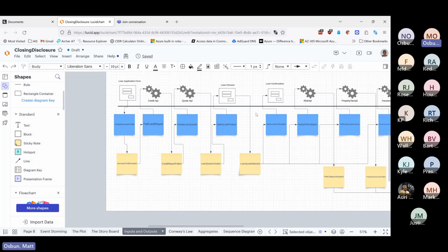If you slice it up vertically into highly cohesive units, then they can be very concentrated, very focused, and therefore very small. And you can say, yeah, this web service is going to take me this amount of time to implement. And yes, somebody's going to try and pretend that you can add all of that up and get a schedule out of it. There's no real stopping that. Just be cautious doing that, because as you add more slices into it, the margin for error gets bigger and bigger. But it really comes down to estimating small things is easier than estimating big things.